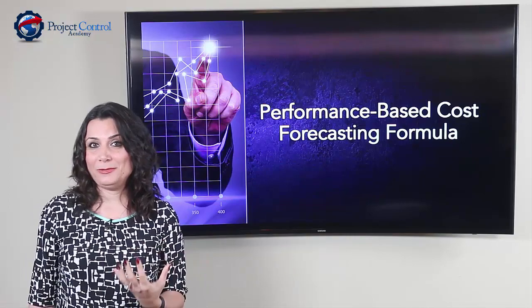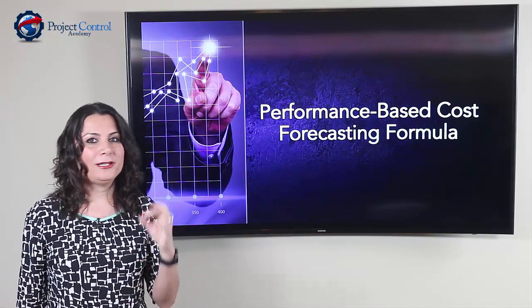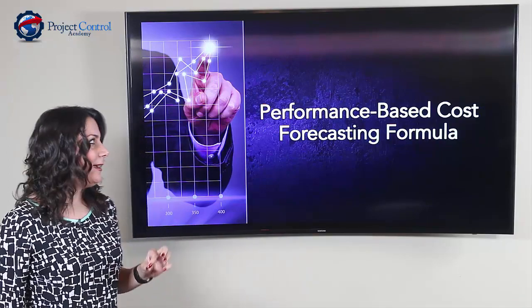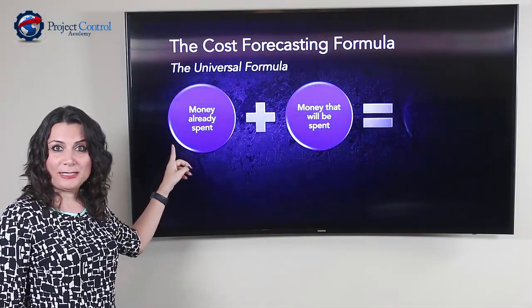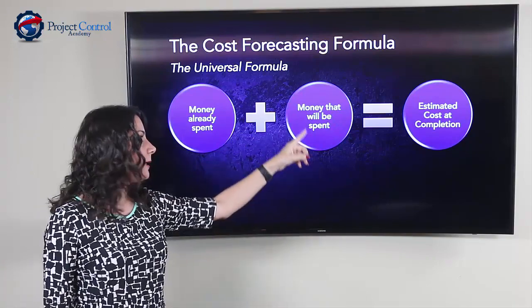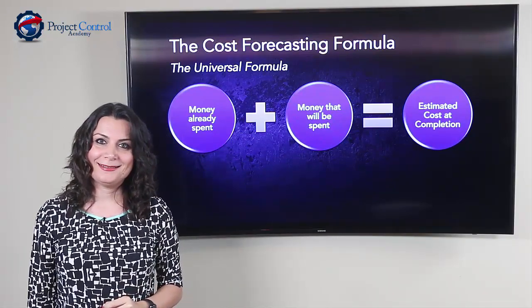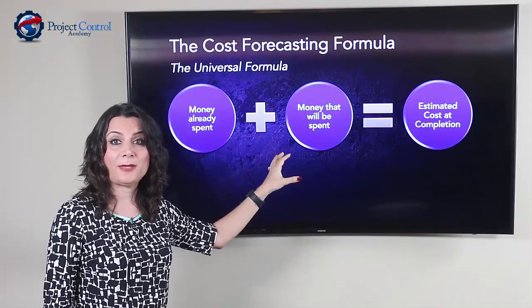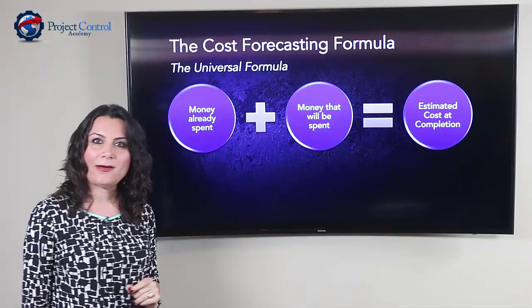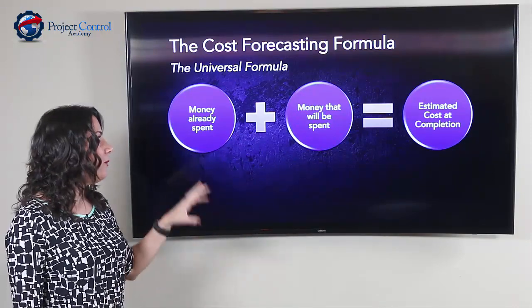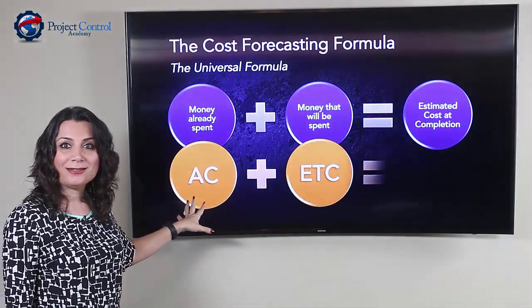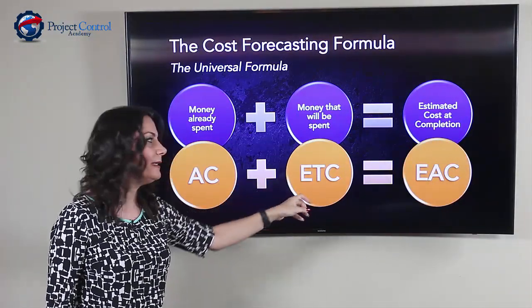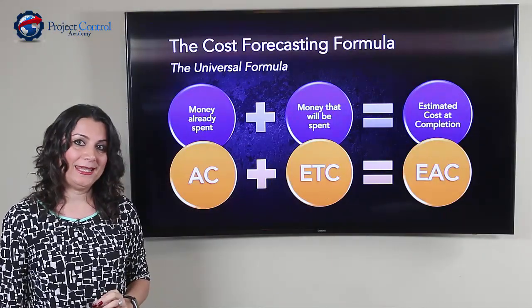There is a universal formula for Estimate at Completion. It is simply: the money that has already been spent plus the money that will be spent equals the Estimated Cost at Completion. Translating that into Earned Value terms: Actual Cost (AC) plus Estimate to Complete (ETC) gives us our Estimate at Completion (EAC).